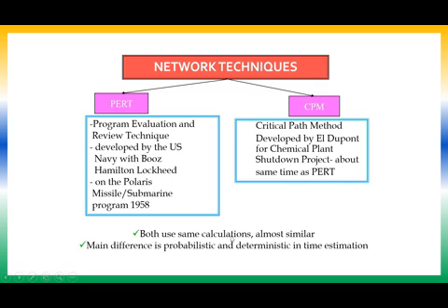See, both these methods have similar calculations, but one major difference between the two techniques is that CPM goes with deterministic time estimation and PERT goes with probabilistic time estimates. So anyhow, in detail we will be studying CPM and PERT in the later sessions. So before going into PERT and CPM, construction of a network becomes very important. So that basics we will be learning in today's session.